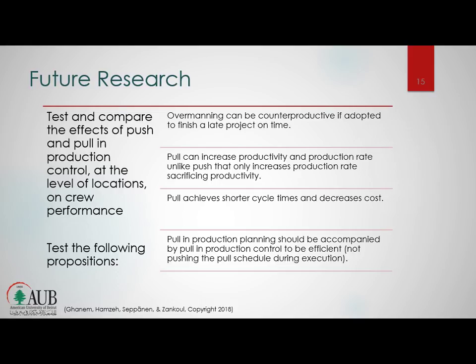However, push can only increase production rate. Pull achieves shorter cycle time and decreased cost, and pull in production planning should be accompanied by a pull in production control and not pushing what has been pulled in the production planning.